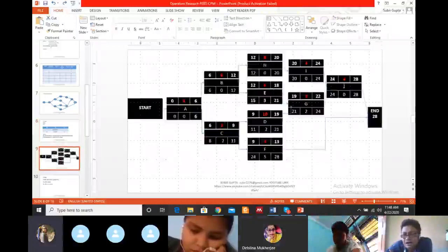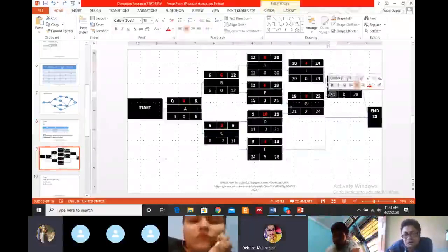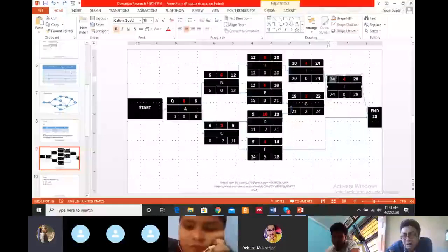For J, what is the latest start? 24. What is the earliest start? 24. So 24 minus 24, 0. Okay? For I, it is 20 minus 20, 0. For G, it is 21 minus 19. So it is 2. Is it okay?